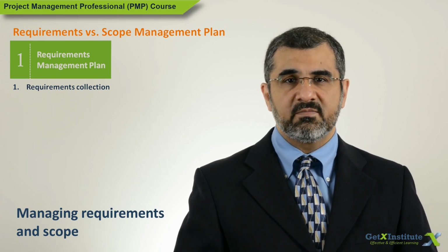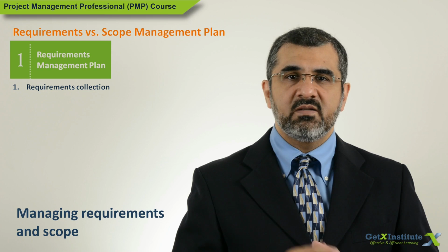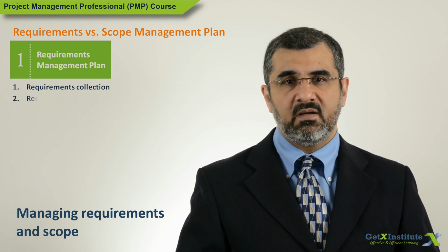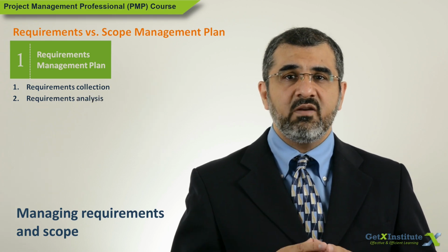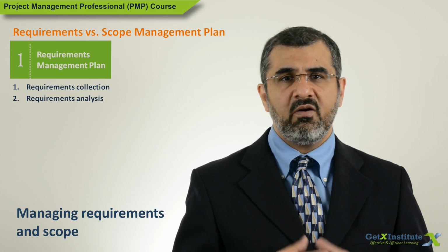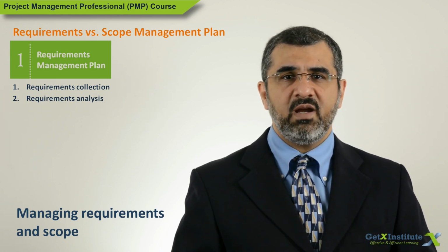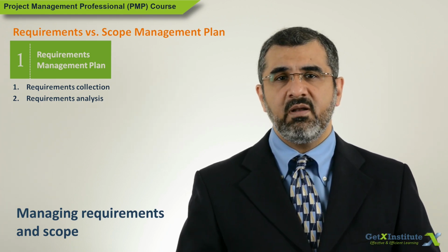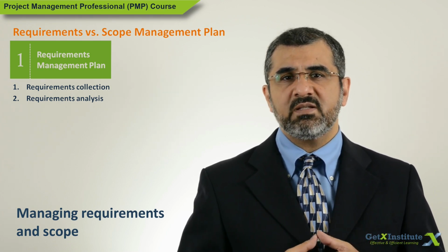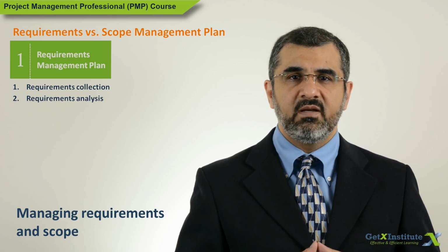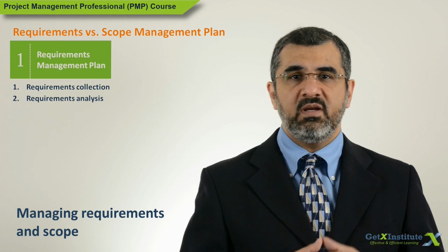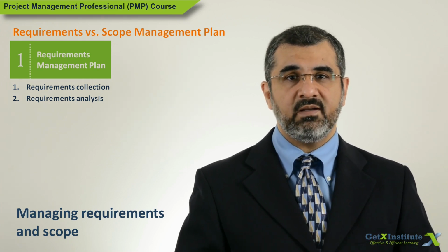Requirements analysis. How requirements will be analyzed to uncover hidden information. Also, to find out if any requirements are unclear, ambiguous, incomplete, or contradict other requirements. For example, a requirements workshop will be conducted, or once requirements are collected and documented, then stakeholders will be asked to review and confirm if these have been captured correctly.